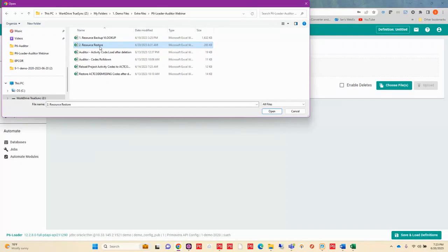Okay. And then the other thing that I know I've seen is, I think it was version 19 or 20, I'm not sure exactly which one, but Oracle did add the ability to give people limited access to the resource dictionary. But it doesn't always work for some of our clients because you only get to choose 4 nodes within the tree, and some of the clients need more than that. So you can't always get the security you want on the resources. Okay. Absolutely.